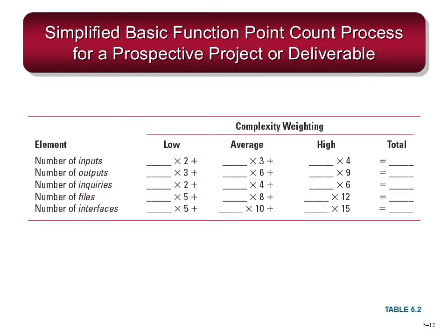This is an example of how the function point estimation is done. So as I said before, the function points are the number of inputs, number of outputs, number of inquiries required. Again, these are the requirements of a software project, or an IT project. So how many inputs are required? Inputs may be from the users. How many outputs are required by the users? What type of queries can be done? How many files would be used? Number of interfaces.